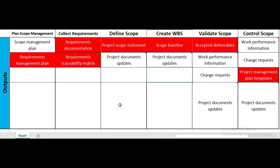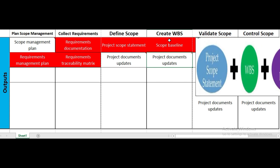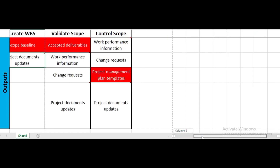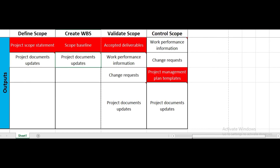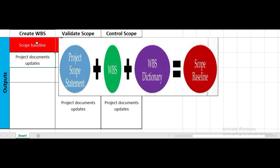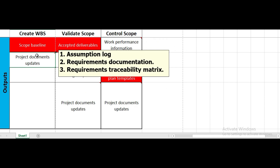The key output of create WBS is the scope baseline. The scope baseline includes the project scope statement, the WBS — which is the hierarchical decomposition of project work — and the WBS dictionary. Combined, these three components form the scope baseline. Additionally, documents such as the assumption log, requirements documentation, and requirements traceability matrix are updated.